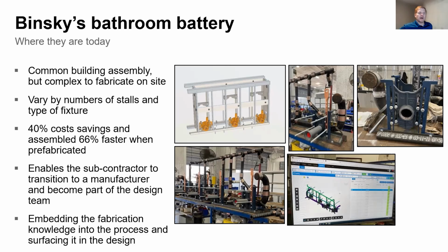By productizing this bathroom battery, Binsky has been able to realize a 40% reduction in costs and the ability to assemble this product 66% faster when it was prefabricated. Moving this into more of a product and less of an on-site fabrication has enabled Binsky to transition from a traditional subcontractor into a manufacturer and really start to become part of the design team, embedding their knowledge of the fabrication processes into the design process and ensuring that fabrication knowledge informs the design of that new bathroom.